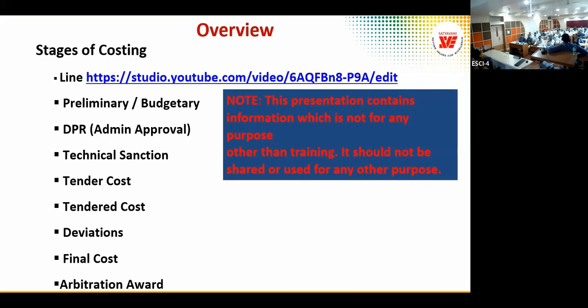In the process, somebody said consultants increase DPR cost for the sake of their fee. Here, I have reduced the DPR cost for the sake of the project. Because our fee is the minimum of DPR and tender cost, whichever is lower, we are paid based on that fee. But still we did it because otherwise the project won't move forward. There is no go for the project.